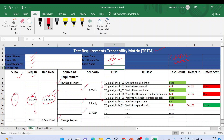For BR 1.0 we have five corresponding test cases mapped in the test case ID column, along with a test case description — a summary of each test case. The descriptions include: check mail in the inbox, verify the open email whether we can open it or not, verify the read email, verify the download attachment in the email, and verify navigation to different pages.